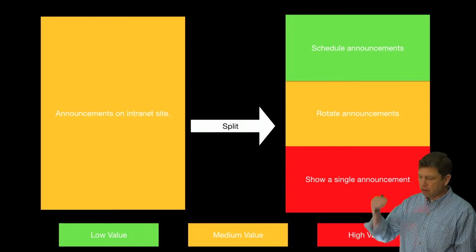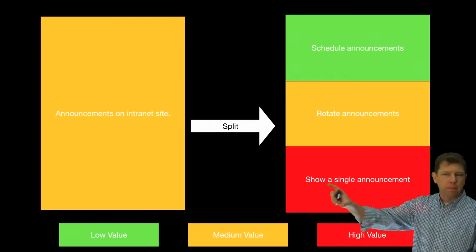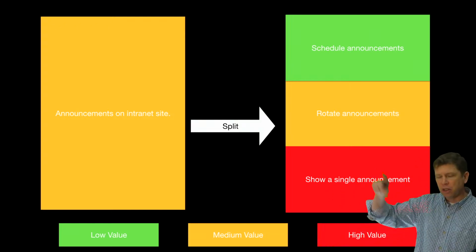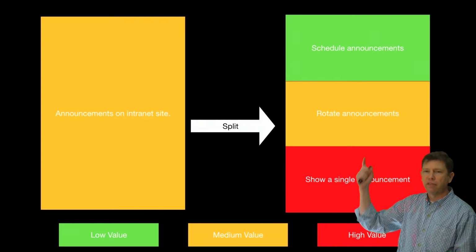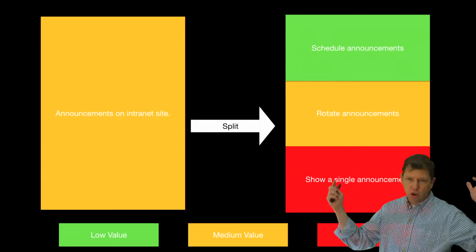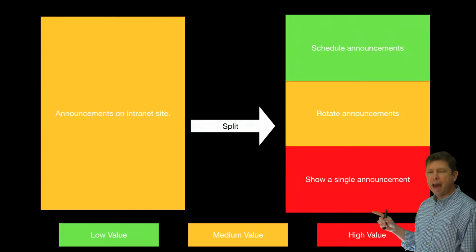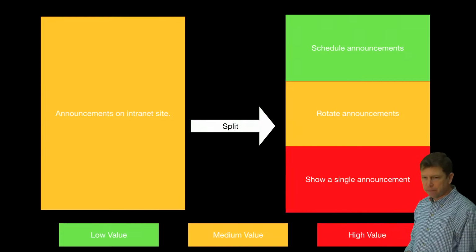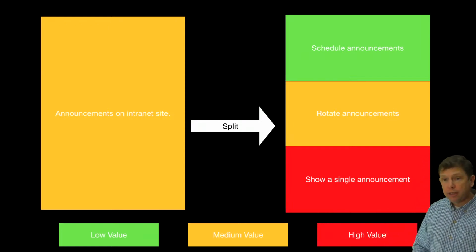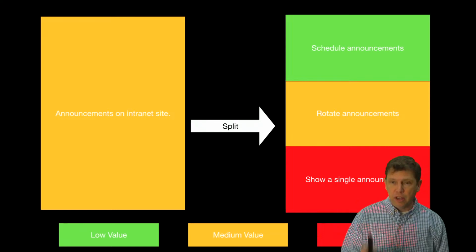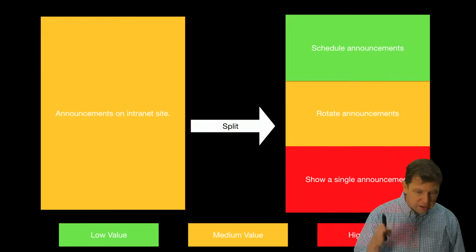If there was just a box and when you type something in the box, it shows up as a banner at the top that you can close that says, here's whatever that information is. We're sending everybody home, or whatever. How valuable would that be if we could just deliver that quickly? Because the developers had said this whole thing was going to take 6 to 8 weeks. And the business said, oh, that would be awesome because I could use this today. If you can give me that, I have something I would put on it today.